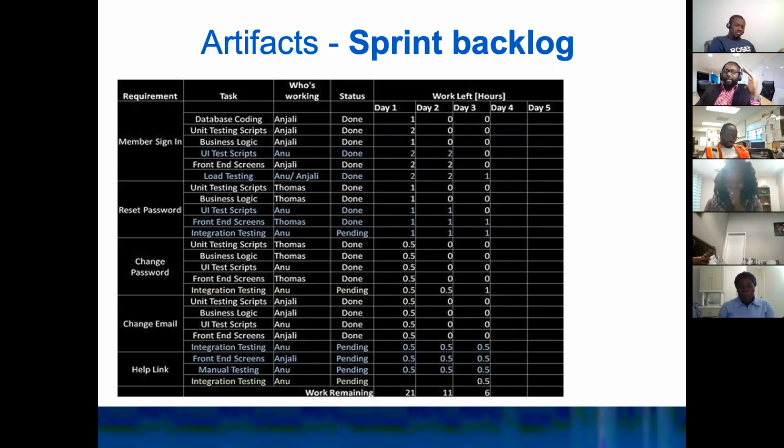So if you have 80, the day you complete that first feature of 5 points, you're going to have 75 remaining. And your chart is going to have a slope a little bit downward, right? Showing you that you only have 75 points left. As you keep completing those stories, you're going to see that slope going down, right? And every day you're tracking the progress and you have an estimate of how much time you have left on the task, okay?